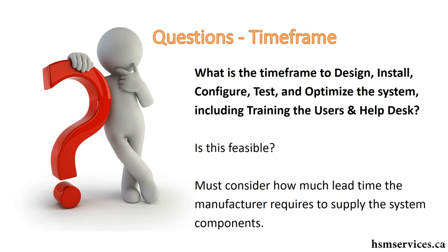And one of the considerations is, if you're deploying a network of thousands of access points or voice over IP phones or computers, the manufacturer may not have stock in the product that you need, and so you have some lead time in terms of being able to even acquire those components.